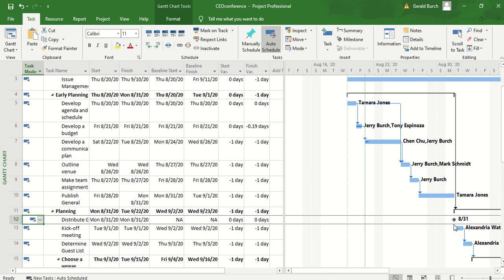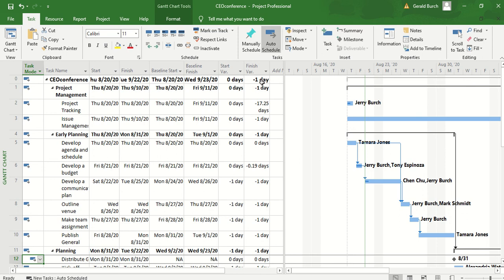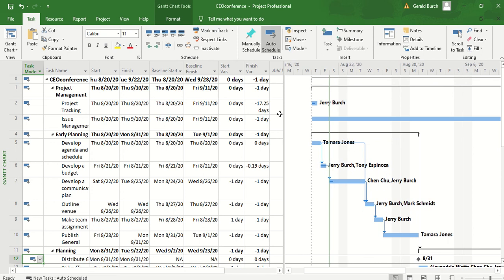With that stated, that gives you all of the information that you need to know about being able to track. You can see from this Gantt chart now that it's already starting to show us some variances. From what I had before, it said I was going to start on a certain day. I'm already a day behind. So the variance helps me track what's going on. This gives me a visual tracking of where I am and what's going on. So we're making progress here with tracking the project, and that should get you finished up.